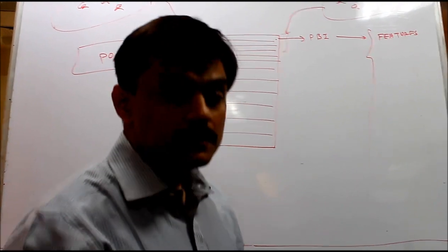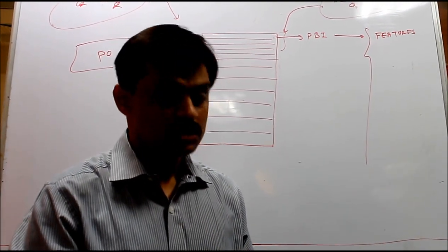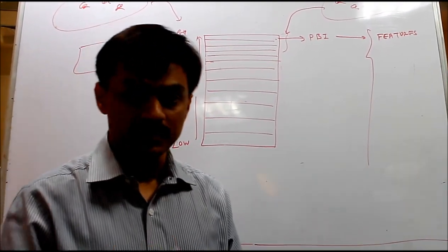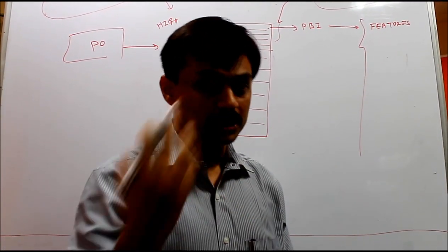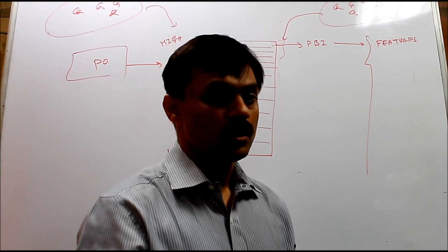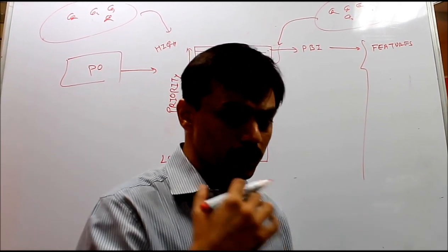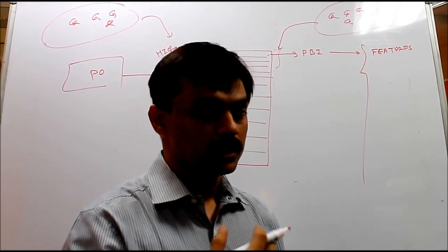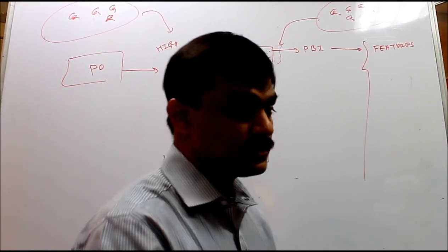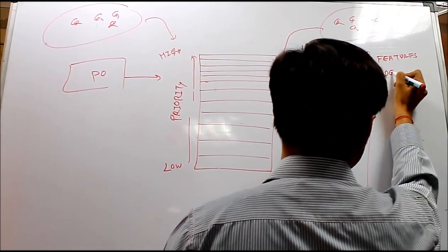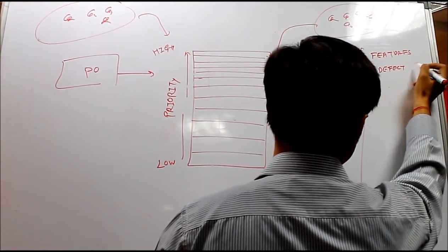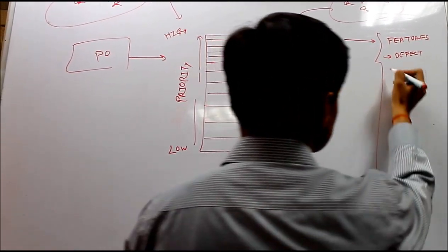But we may have some other items in the product backlog, such as work related to defect repair. So if we have a defect which was found on a done story, that defect also comes under the product backlog because the product owner is the authorized person to prioritize the fix of that defect. So the product backlog may include work related to fixing the defect.